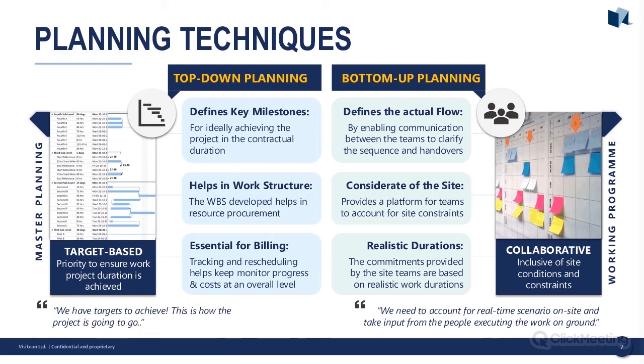And the bottom-up approach allows for commitment-based planning. So if you're involving the people that are actually going to do the work, getting them to commit to their own activities and saying, okay, I can do that, but it needs to be on this day, rather than just, here you go, do this, you're going to get a much more realistic duration of work and a much more accurate way of planning and executing a project.